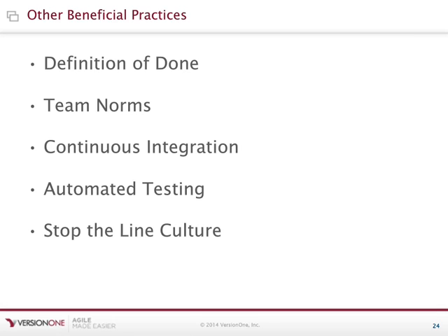Team norms are another place: how do the teams work together? Something as simple as what time does stand-up occur, but also what work can be done in pairs and what work can be done solo. I have one for the teams that I work with, and it kind of ties with my definition of done. My definition of done means that the release notes have at least one sentence, even if it's just, Jerry, don't forget to write about XYZ before I close a story. And so one of the team norms that I have for the teams that I work with is nobody closes stories but me, because I want to make sure that I've got that release note piece taken care of. That way I don't get to the end of a release and struggle to remember what we did and what I need to document.